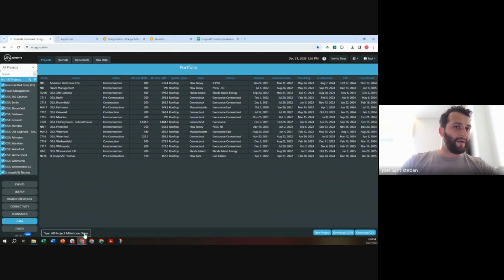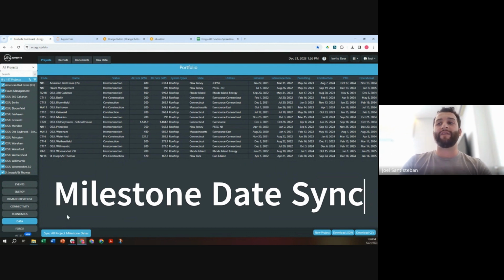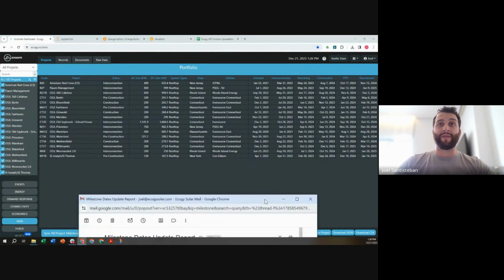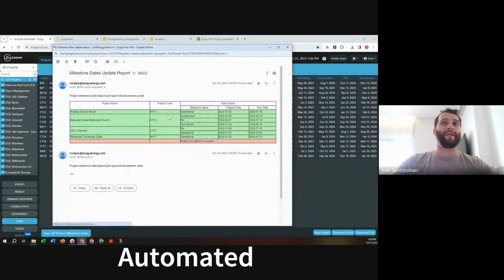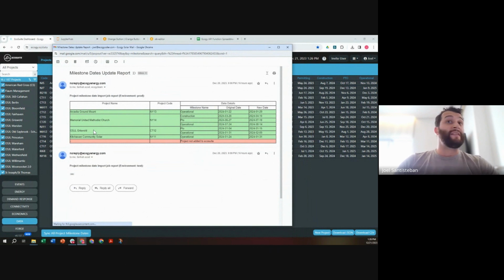You'll also notice this milestone dates button here. This is a manual way to sync dates associated with these projects, the ultimate source of which will be very complex Gantt charts that live at the edges of our workflows. We abstract that here by soaking it up through an API. So not only can we sync it manually, but these daily updates will run no matter what. And here's an example of one that ran last night. So I've got 4 projects where dates have changed.